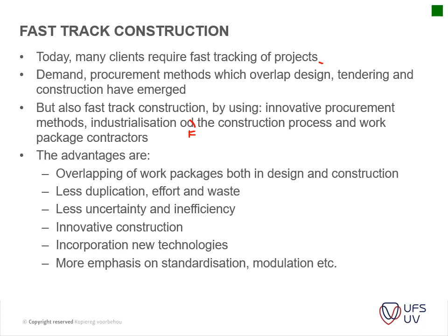What we've done on certain projects is, in the tender document, we moved some of the design responsibilities towards the contractor. For instance, if it's a big mechanical installation, the mechanical supplier and installer actually does the design and the installation of the works, so you've got work packages like that which you just manage.